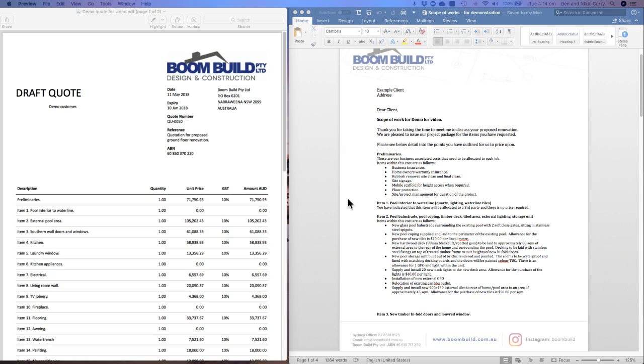We've included floor protection in our preliminary items. Further down in his items, item 11, I believe, is where we specified his flooring, but we did want to be able to let him compare actual flooring costs. So we have left flooring protection in our preliminaries, and many people may say, well, why do you need it? Basically, it's easier and cheaper to protect a floor and look after a brand new floor than have to try and fix it should it be damaged.